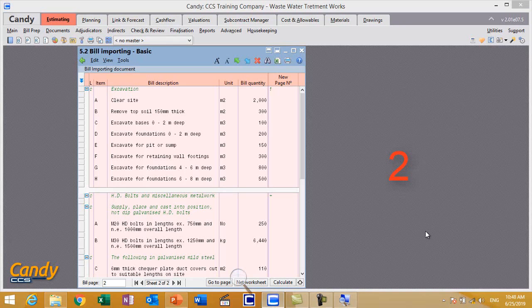That's up to you, and Candy will do it for you. But we normally sum groups of items that come in sections of the BOQ. For example, we sum the items of earthwork, sum the items of concrete, sum the items of metalworks, and so on. Then we sum all the 3 sums to get the total BOQ.